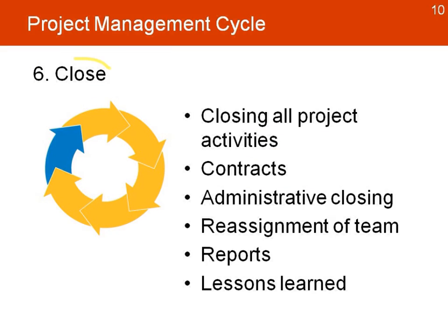And finally, the closing phase, when we close all the project activities. Once we complete all the work, we also close the contracts. There is an administrative closing process, reassignment of the team, final reports, and the lessons learned.